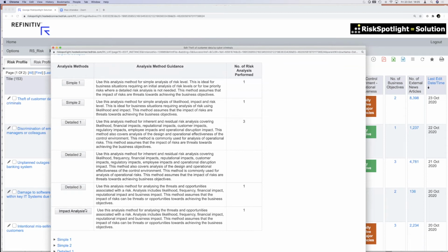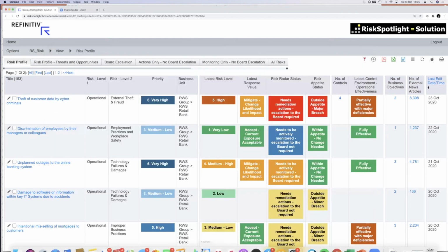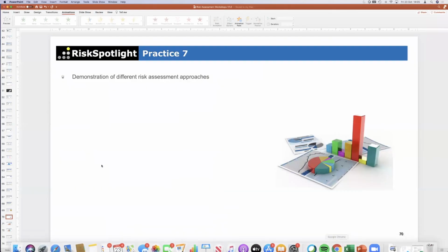So depending on what their business situation is, if it is something quick and dirty they need to do, where we're not still launching the product, but when they're thinking about the product launch and the approval is going to the committee, then you want them to be a little bit more rigorous. But in the initial days, where they're still brainstorming, if they are still thinking about the risk, then we have to give them something simple. So that's what we mean by the menu of assessment options.